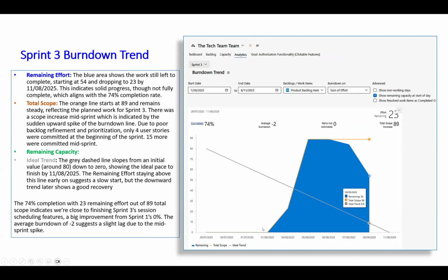Sprint planning 2 was not completed because one feature was missing. That is, the find a mentor user story was not part of the product backlog we were going to commit into sprints. So we had to go back to our board and refine all our user stories again. It was an eye-opener for us, thinking, what's the user journey like? Why are we not committing the most important user stories?